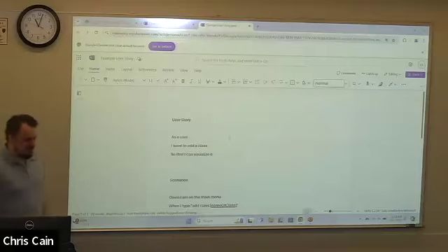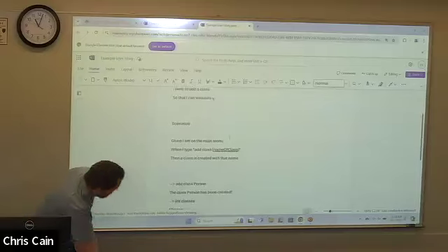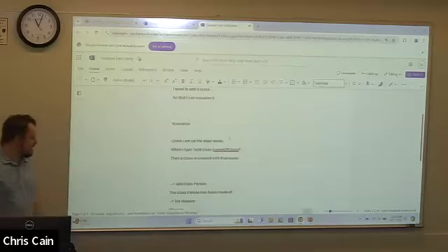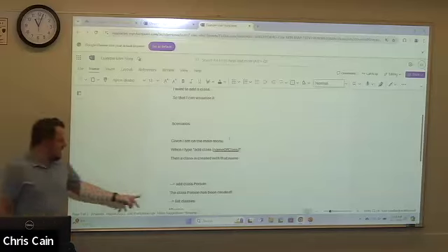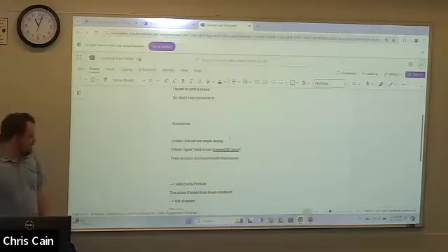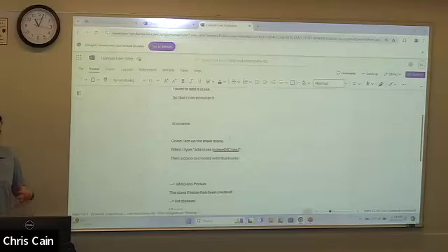A scenario that might come from that user story, and there's a problem with this scenario, I'll ask you about it in a moment, but I say, given that I'm on the main menu, when I type add class followed by the name of the class, then a class is created with that name. So we're starting to get a little bit more technical, but also even still from the user's perspective, I want to be able to see that that class is created. What does that mean in the scope of a command line application? You get some kind of prompt or something that tells you that that class was created.